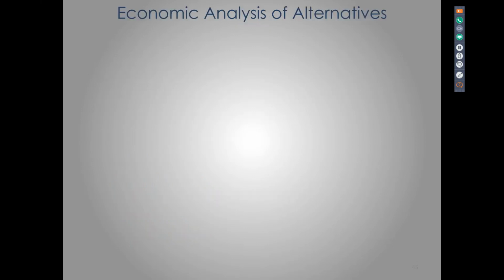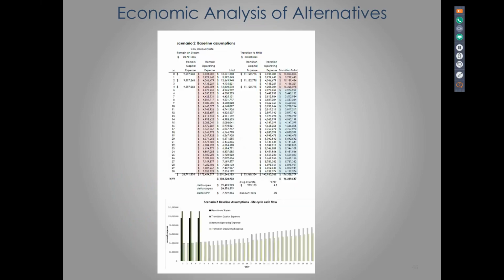Okay, and then another slide about sort of the rubber hits the road. We really have to demonstrate the economics of a project that's on the roadmap here. So we often do life cycle cost comparisons. We look at something that's got a 30-year life. We look at the operating expense and take a net present value of the expense and then compare that to an alternative. Often that alternative is, well, don't do anything different. Do nothing different versus alternative A. What's the net present value difference there? Alternative B. Kind of a tedious process, kind of the interface of engineering and economics, or engineering and finance.